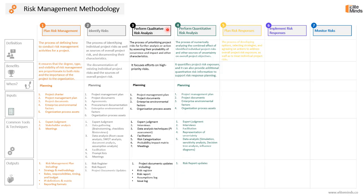Once we are done with risk analysis — both qualitative and quantitative — we will start planning for risk responses. It is the process of developing options, selecting strategies, and agreeing on actions to address overall project risk exposure as well as to treat individual project risks. This is the most important process as part of the planning phase for risk management. In this process, we develop appropriate actions to deal with identified and analyzed project risks. It identifies ways to address overall project risk and individual risks, allocates resources, and inserts activities into the project as needed — minimizing threats and maximizing opportunities.